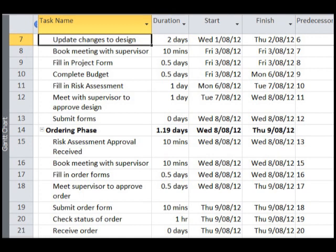We again need to consider the order that the items must be completed in. Sometimes there might be a period of time that needs to pass before the next step can occur. In project, this is called lag.